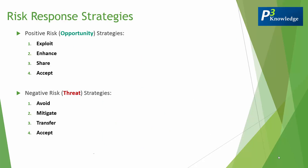In summary, the risk response strategies are as follows. For positive risk or opportunities, we have: exploit, enhance, share, or accept. For negative risks, we have: avoid, mitigate, transfer, and accept.